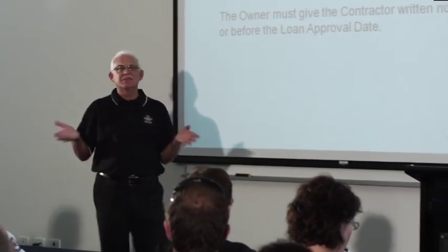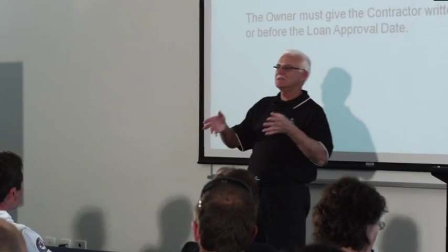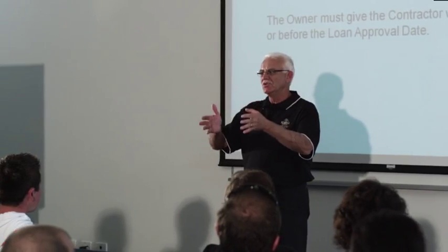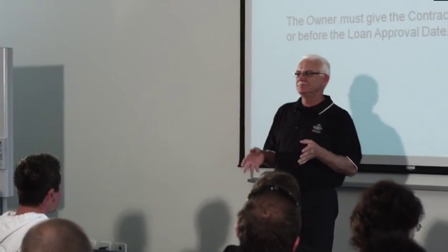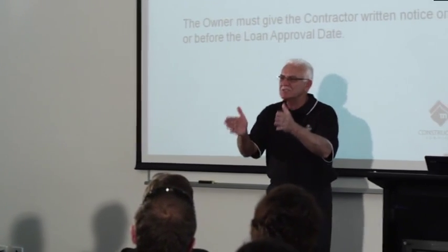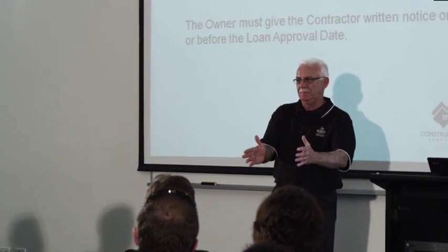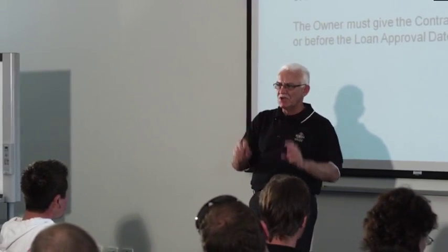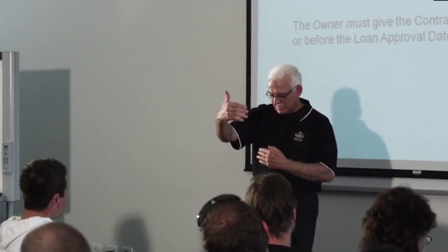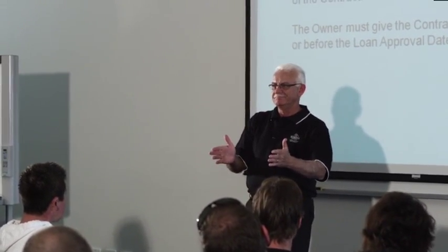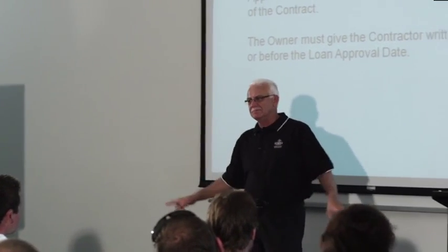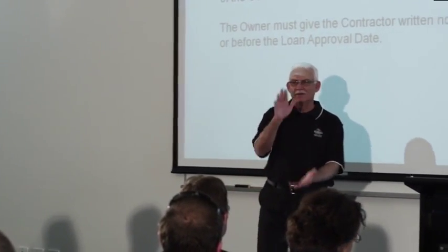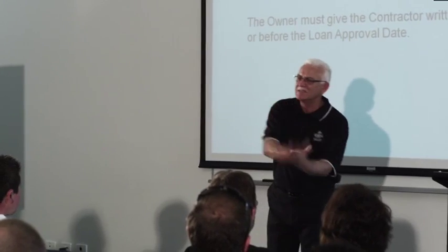The tile has given you, the builder, an allowance of $40 a square metre. When you do a provisional prime cost or PC, you've got to specify what the labour is. So you're going to put in your specification that you have allowed for the tiler to lay 300 by 300 glossy, flat, ceramic tiles on a cement base or an elastic base or whatever you want to call it. That's in your specification.